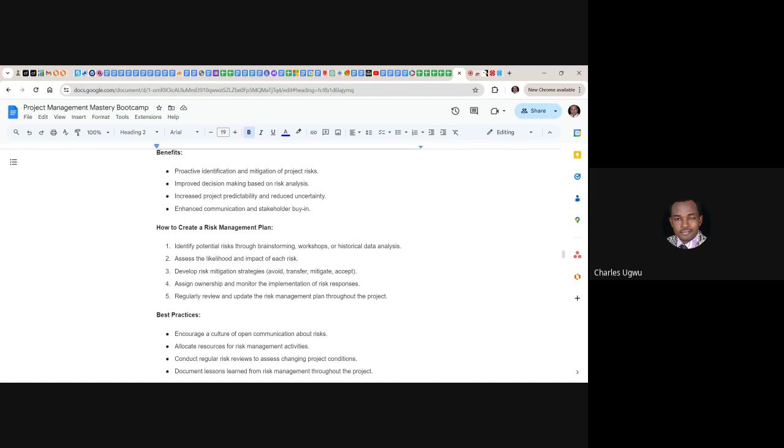So the project manager will assign a risk to a risk owner and assign a due date when that risk or that deliverable should be done. If by that due date the risk owner could not resolve it or come up with any tangible plan on how to resolve the risk, reduce its impact, or close it, then the risk has to be escalated to the higher authority.